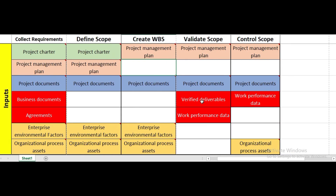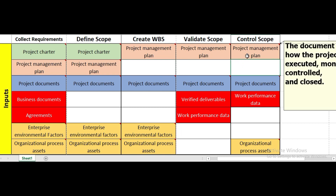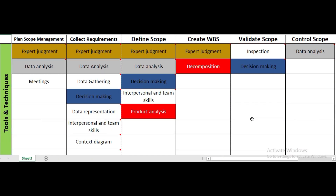Enterprise environmental factors and organizational process assets continue as inputs. In validate scope, the distinct inputs are verified deliverables — received from the control quality process — and work performance data from the execution process group. For control scope, the inputs are project management plan, project documents, work performance data, and organizational process assets.